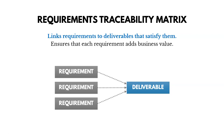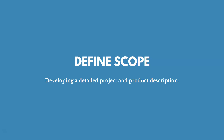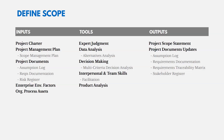Now that we've planned scope management and collected requirements, we define scope — developing a detailed project and product description, often a narrative a few paragraphs long. In define scope, one of the inputs from the project management plan is the scope management plan, because it tells you how to define your scope. You could also have project documents like requirements documentation. Enterprise environmental factors and organizational process assets are also key inputs. Tools include alternatives analysis to figure out different options for getting the work done, facilitation, and product analysis.